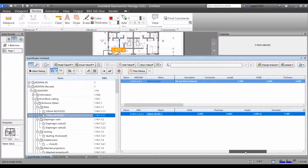Let's go further to area. Now area is 13.14 meters because it's now taking the 4 point something meters that we had earlier in the linear dimension and multiplying it by the height, which is 3 meters. And the area now becomes 13.16. And if I go further down on my quantities, or my primary quantities, I can now see that I have a quantity here, which is 13.168 meters. This is how you can manipulate and extract information from the model itself.